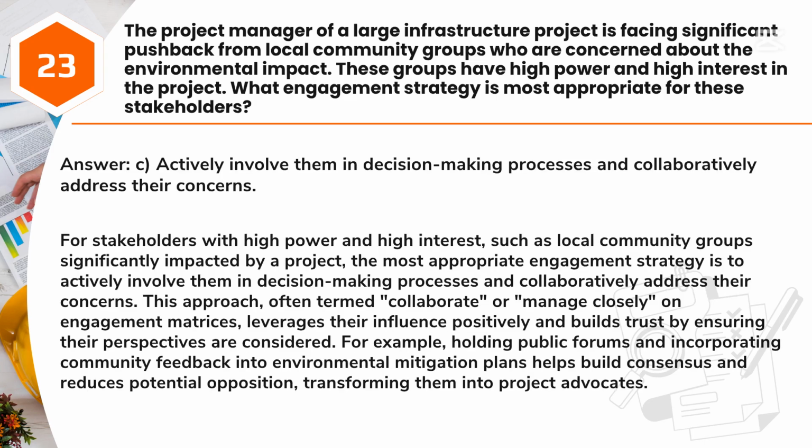Answer: C. Actively involve them in decision-making processes and collaboratively address their concerns. For stakeholders with high power and high interest, such as local community groups significantly impacted by a project, the most appropriate engagement strategy is to actively involve them in decision-making processes and collaboratively address their concerns.